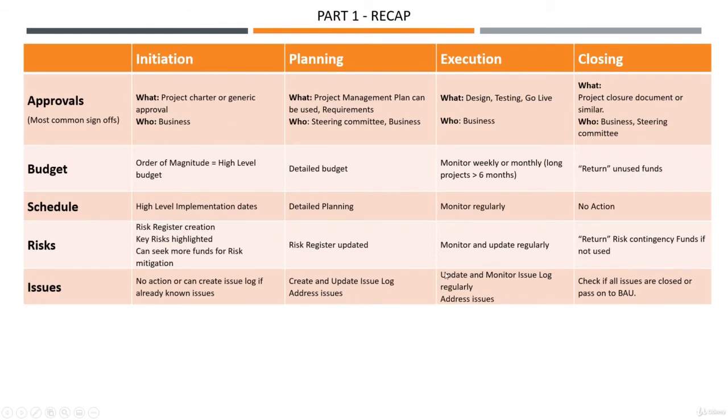During execution, you continue to update your issue log, you monitor your issue log, you have owners and timeframes, and you keep a close eye on those. And then you address issues, if you can.